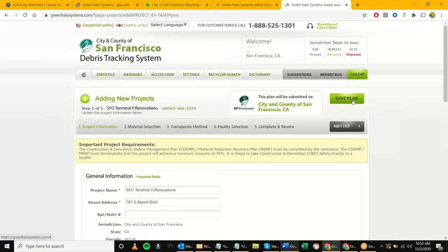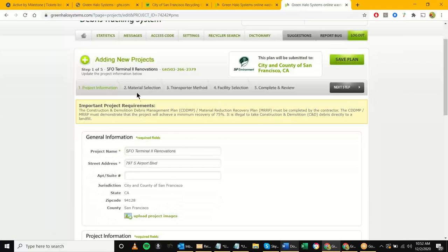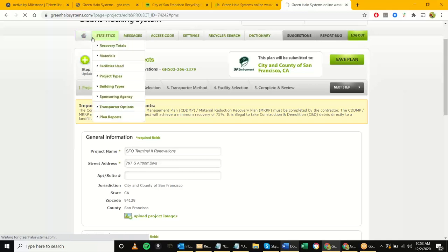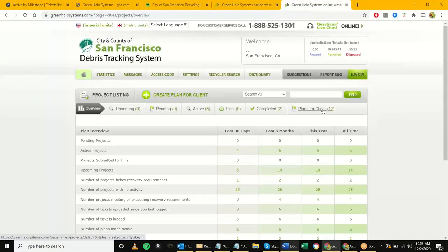In order to get to that point we need to hit 'Save Plan.' It's important to highlight that you don't want to move on to the next step right now — this is where the contractor is going to be identifying the materials, how they'll be transporting those materials, and which facility will be receiving them. You don't really need to proceed to the next step; the contractor will be doing those next four steps. Once saved you get the confirmation and can go back to the home screen to the 'Plans for Client' section.